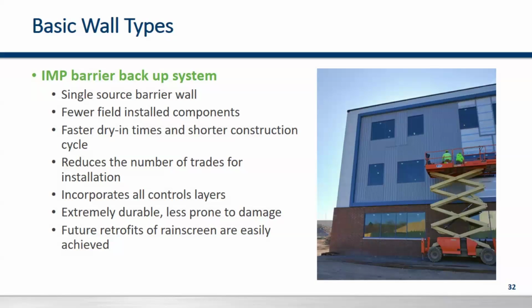And as far as equipment, because there's not multiple trades, there's not as much equipment and as much organizing. It makes it easier for the general contractor to control it, and also reviewing the quality of the install. You're not monitoring multiple trades.